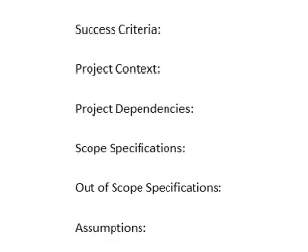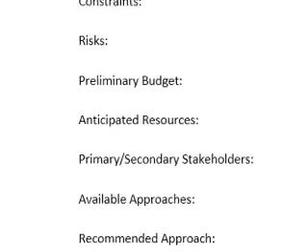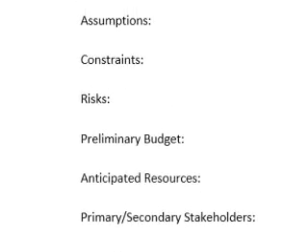In scope is updating the computers. Out of scope is installing QuickBooks for the instructor. To be polite, you would submit a separate work ticket for that so that someone else could work on it and let him know, so that you're providing good customer service, but you would not put that as part of this project. Assumptions are that the electricity is working and things like that.